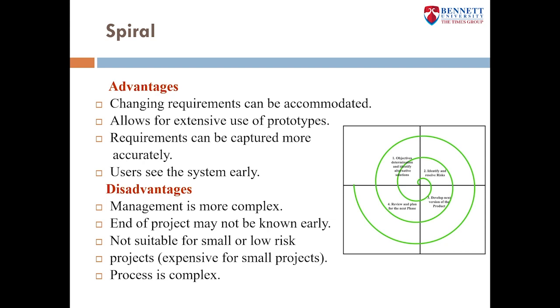It allows for extensive use of prototypes. Requirements can be captured more accurately, and the users can see the system early. Some of its disadvantages are management is more complex, the end of the project may not be known early, it is not suitable for low risk projects, and projects can be expensive as well as complex.